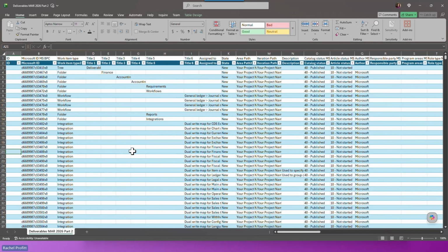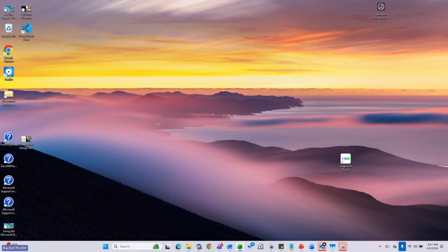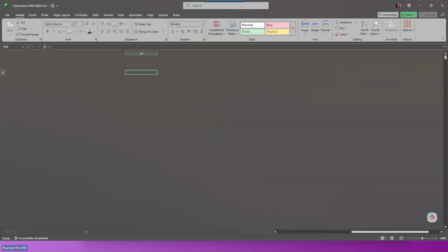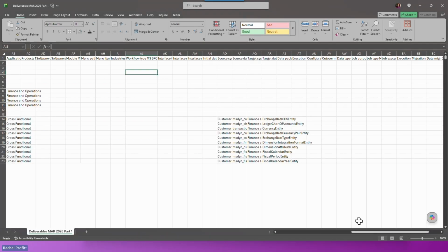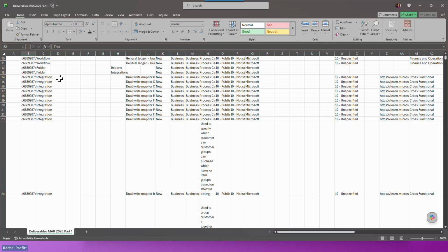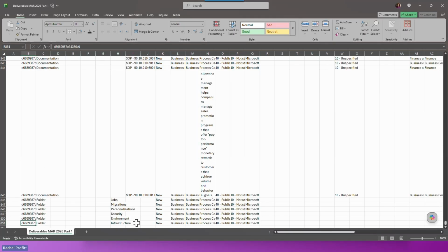So I actually have two deliverables files. The first one I've already modified, and I'm going to open that one up. So part one, I already modified to be a CSV file, and I have deleted everything after row 851 in my file. You are allowed to do up to 1,000 rows. You can go to 999, or exactly 1,000 if you want. I prefer when I split the files to split on even tree levels, right?